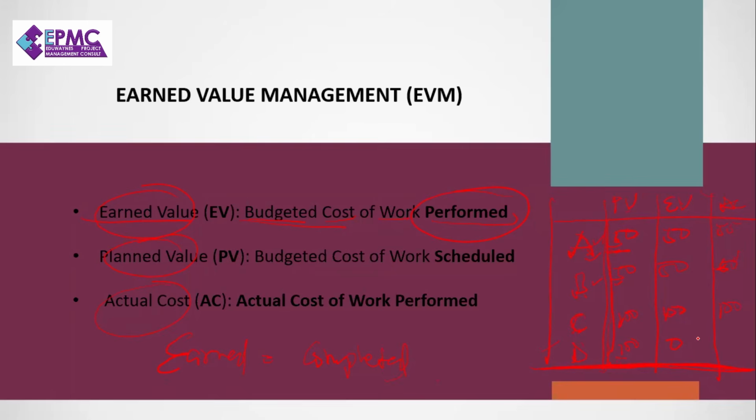So if the amount is 100 and you are halfway through, end value will be 50 cedis. Okay, that's what we use. So here will be 0 because we don't know. Once it has not been performed, we can't tell. Okay, so that is what we do. If you have this set of data, you could now analyze and know how you are performing.